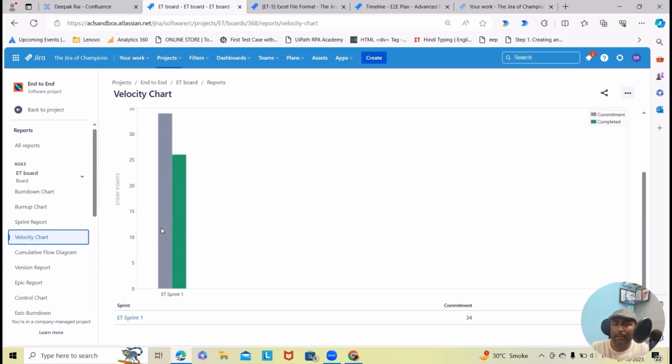So let's understand the important tips whenever we are working on a project. First, before directly jumping into the project, we have to understand the requirements, outline all those requirements in the documentation, and take the approval, so that we do not end up in a situation of change requests after the development. That will kill a lot of your time, and we might end up with a loss from the company's point of view.